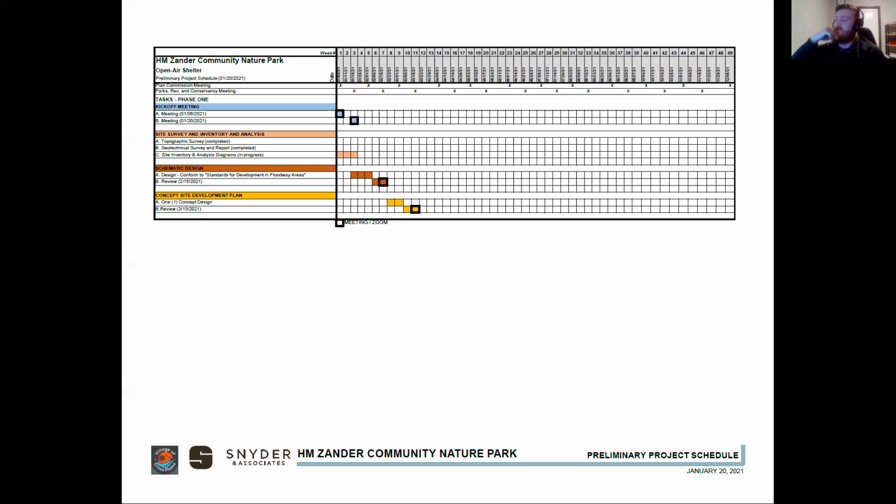That's something that could be looked into, but the con is there would be other mitigation steps we would have to take in order to meet the no rise requirement. I haven't run or tested it, but the more obstruction we add, the more we would have to do to mitigate for that and to prove that. So it's not out of the question.